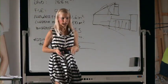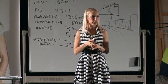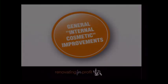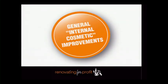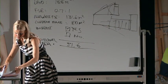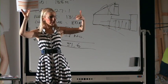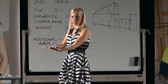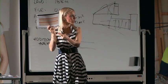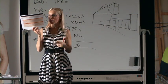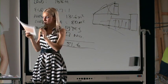Let's look at all the ways you can add value — 140 ways — and we'll move through this fairly quickly. First, we'll look at internal cosmetic improvements. There is a checklist in your system called the Adding Value Checklist, done on a room-by-room basis. You'll go through your property inspection and tick off what you can do, then come back to your financial feasibility to work out which ones add the most value and which ones you can afford. You might identify 200 things but only be able to afford 100 — pick the ones that add the most value.